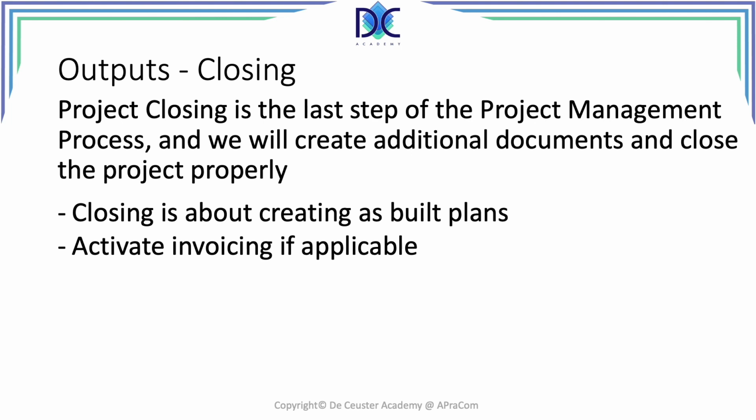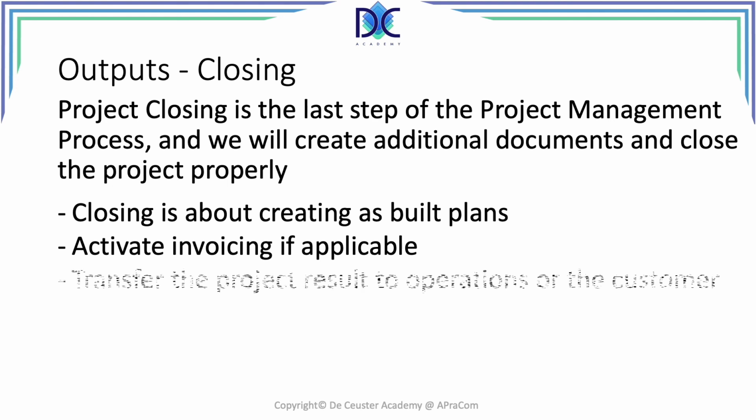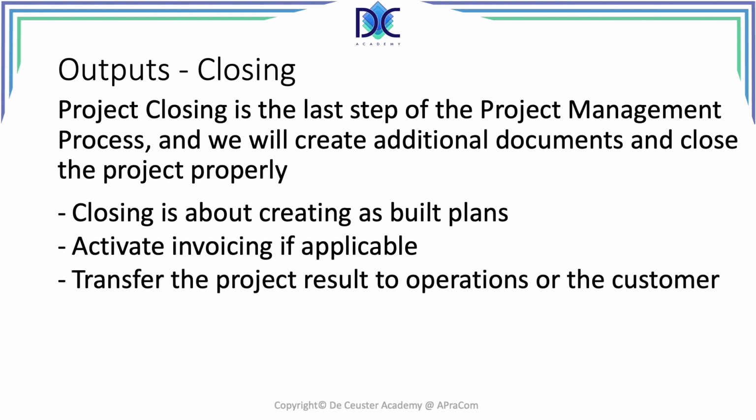If you don't activate that the activity has been completed and you don't activate invoicing, you will see that basically nobody will send out an invoice, nobody will receive an invoice, and nobody will pay for the invoice. We also look at the transfer of the project result to the operations department or to the customer, who will from then on deal with the project, how it has been created.